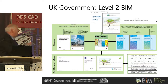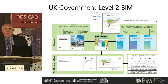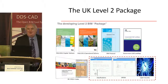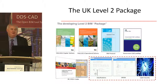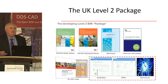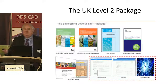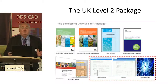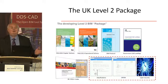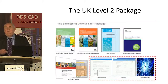We produced a number of documents, standards, and protocols that we built this whole thing on. As we went through, we found we had to grow that package of information because there were things we hadn't thought of at the start — for instance, we didn't know we needed a firm plan of delivery work to anchor the process. We also came across the problem of security: sharing huge information models so widely that some might actually be so sensitive you shouldn't show them to everyone. So we added a security module to the package.